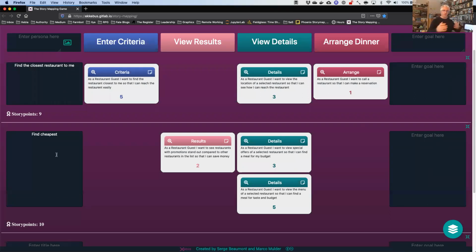So Alberto, if you are the product owner now, and you would have to choose between cheapest first or closest first, what would you choose? What do you think is more important? Closest. Boom. So what's nice now is that because you've made the choice at the higher level, all the stories under it basically just come along with it, right? So we've ordered 6 stories, and of course this is a play example, with one decision, just saying this one higher level concept is more important than the other one, and all the stories go along with it.